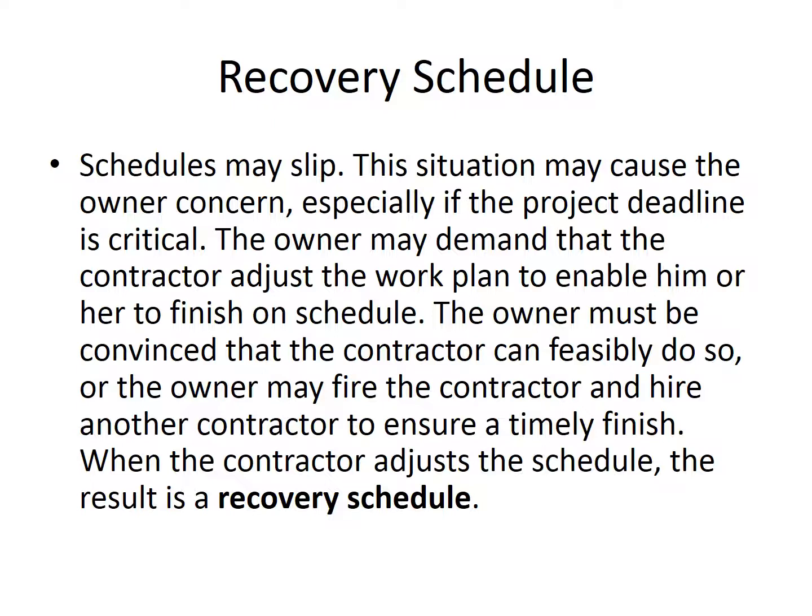When the contractor adjusts the schedule, it's called a recovery schedule. You have to be careful about recovery schedules, because if in any way it differs from the contract schedule, you can end up being liable, or that can become litigious at times. And I've seen certain instances where a contractor bids on a certain amount of work, puts together a recovery schedule, and all of a sudden the subcontractor is no longer able to keep pace. So in order to avoid going under, the subcontractor might sue the contractor, or whatever the case may be. But recovery schedules, if they differ from the construction schedule, can be difficult to deal with.